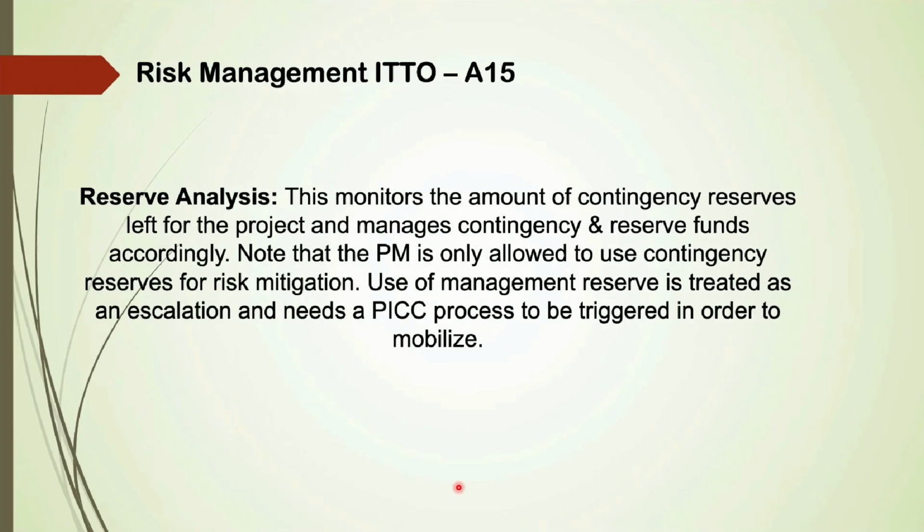Answer: reserve analysis. This monitors the amount of contingency reserves left for the project and manages the contingency and reserve funds accordingly. Note that the project manager is only allowed to use contingency reserves for risk mitigation. Use of management reserve is treated as an escalation and needs a perform integrated change control process to be triggered in order to mobilize the funds.